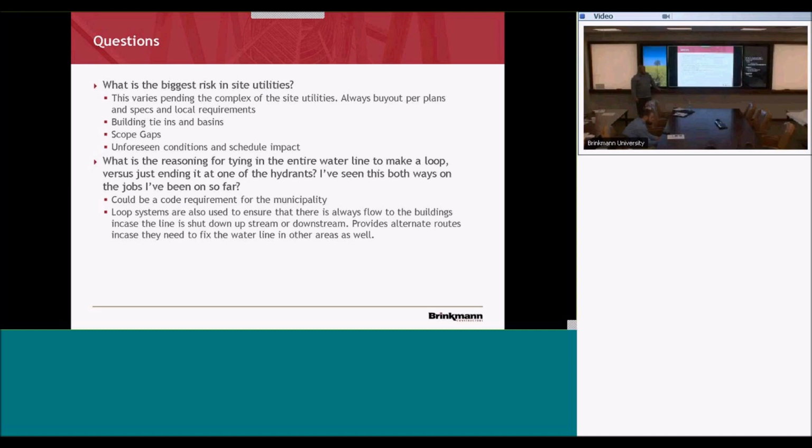Like they'll miss something. So we hit a concrete whatever in the road and called the water authority back out and said, "What is this?" And they said, "It's not ours. Go ahead and dig it." It was a 60-inch water line. And we hit that, and there was water 150 feet in the air. Good video of that. We didn't have to pay for it because we got a letter saying not our problem.